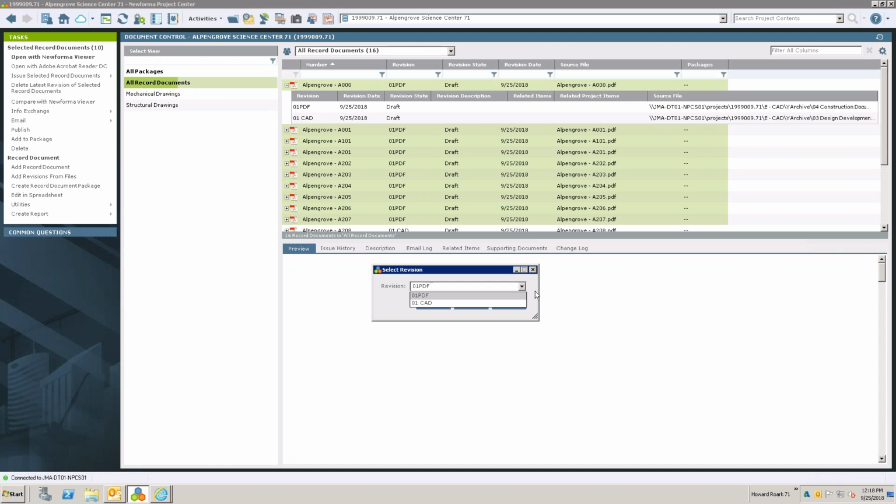Okay, good. Yeah, that might be the easier way to handle that, because that way you can still have the working drawings in their file, and then you can copy them and place them into the final file and mark them as revisions. But when you add them from that approved file, when you're ready to issue, still add them as revisions, but maybe just make sure that you change the revision number and then put PDF after the end or something, so that you know when you come into issue that you're only pulling the PDFs, you're not pulling the CAD files. Good.